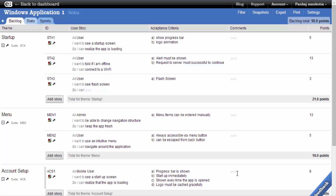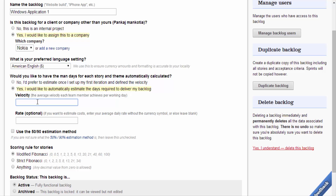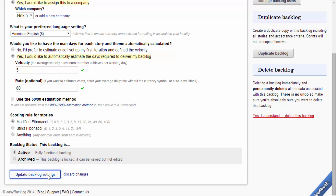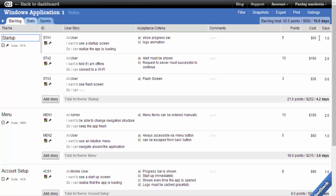For cost estimation, we use two terminologies. The first term is velocity, defined as the number of points that a team member achieves on average per day. The second term is day rate, which indicates the cost of the backlog total, theme total, and individual story. The points per day is simply multiplied by the day rate to give the cost of each story. We define those terms in settings. Let's say our velocity is 5 and rate is 60, and we can see that cost is indicated using these terminologies.